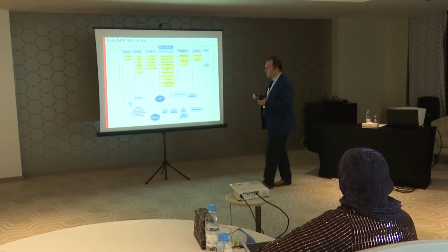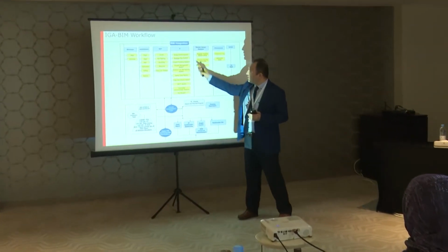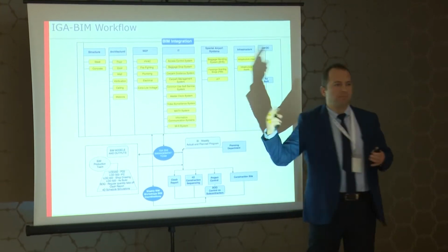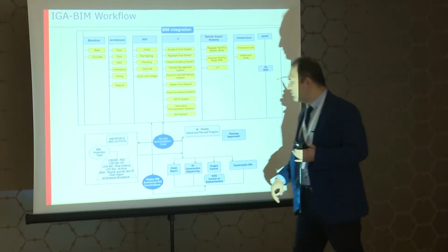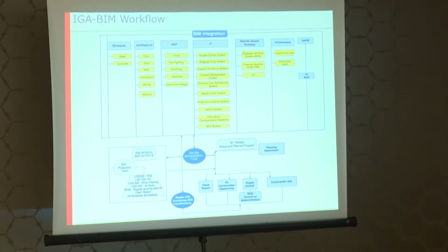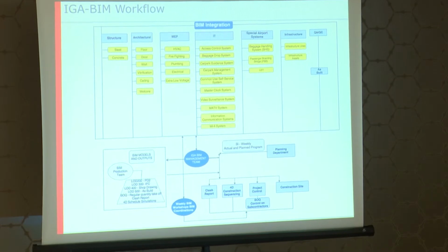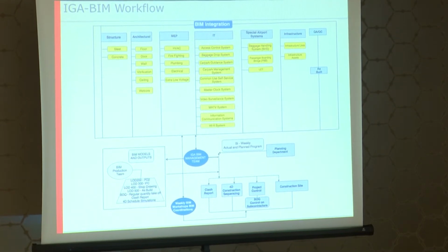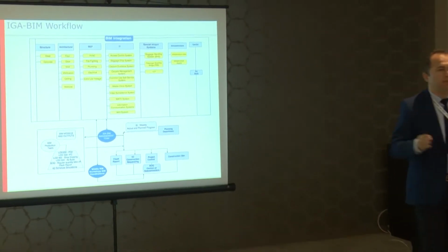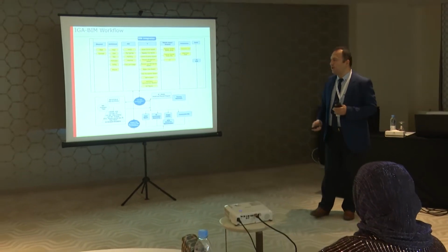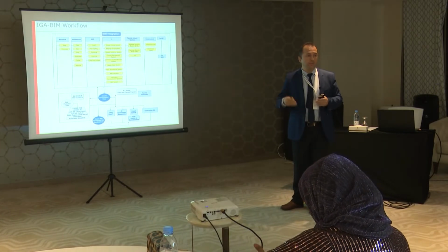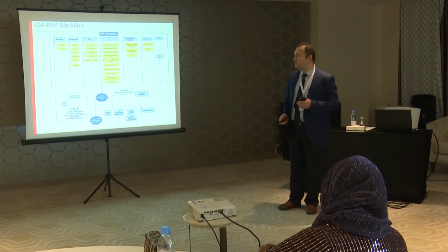So they worked with a partner company in India, and the BIM department got the BIM model through this company, with weekly meetings around a big table in a big meeting room with a big virtual reality system. They checked the model on a weekly basis and tried to plan weekly progress on site. If there was any mistake or any clash, it should be fixed even before it was executed on site.